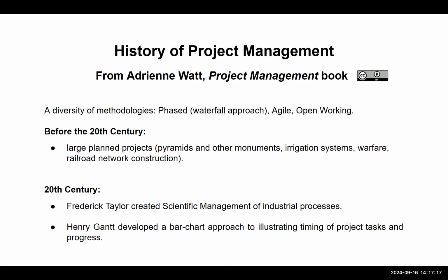So you can see, I have to do this thing first, and then I have to do this thing second, and if I delay the first thing, I can't do the second thing. Or sometimes I can do something else while I'm waiting for the first thing, and it's optimal in terms of getting things done in time.